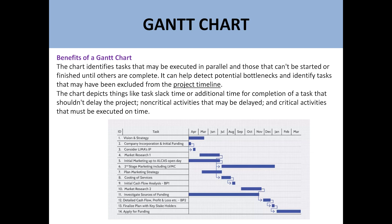Gantt charts have important benefits. The most important benefit is that it identifies tasks that may be executed in parallel. For example, take 'vision and strategy' and 'company incorporation and initial funding' — these two tasks are independent and can be run in parallel. So the first advantage is that you can identify tasks which are not interdependent on each other and can be executed in parallel.